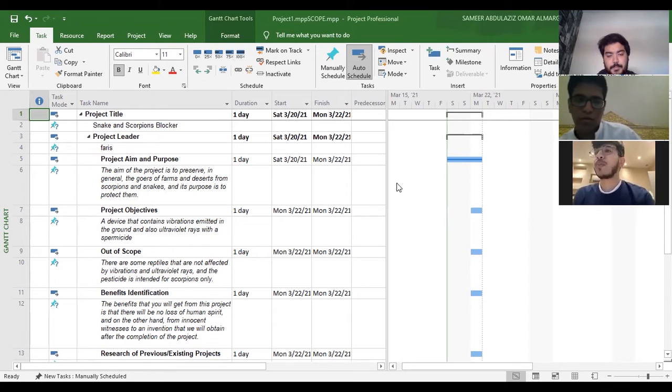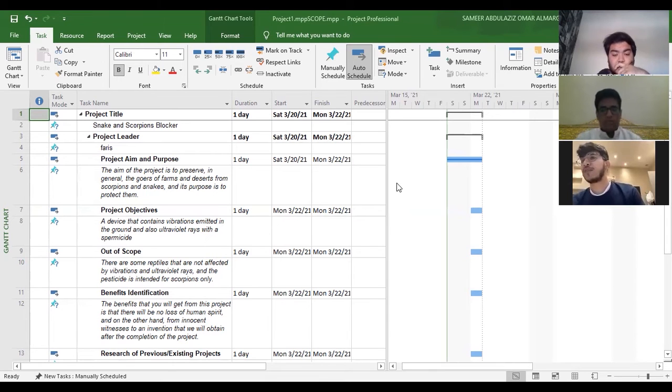And product criteria. Here we have a defined acceptance process and defined criteria for accepting a completed product, service, or result of the project. And the fourth thing, the project deliverables. There are two types of deliverables: direct output and additional outcomes. And the fifth thing is the project exclusion, or the out of the project. It's a very important subtopic. It states to the stakeholders, as Sameer talked about, what is not part of the deliverables.